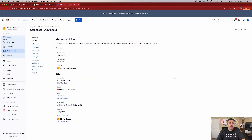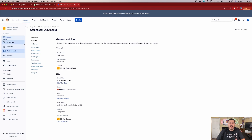When you create a brand new board, it is going to inherit the key — that is the three to ten letters you pick for your project name — and that key becomes the name of your board. If you don't want your board name to just be the key, maybe you want it to be your team name, you can click on the little pencil and change your board name to whatever you want. Next up, we have the administrators — these are the people that can make changes to the board. If you want other people to be able to rename your board, rename the columns, change the order of the columns, then grant them administrator access in this section.